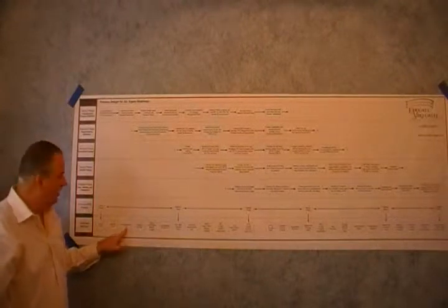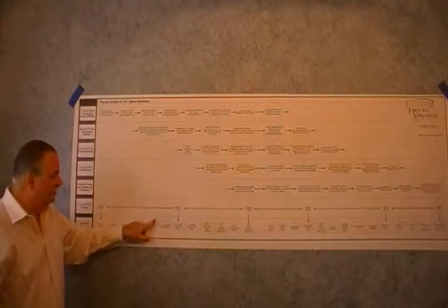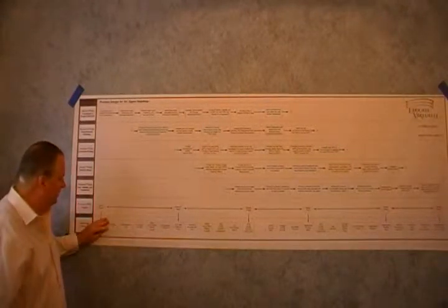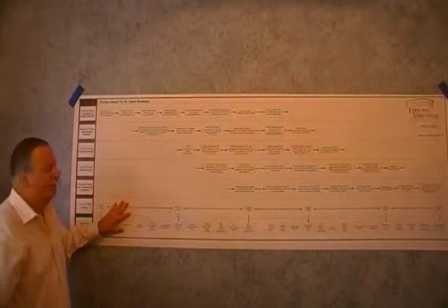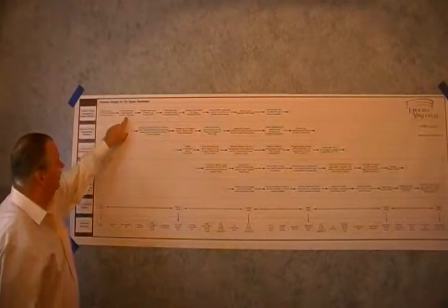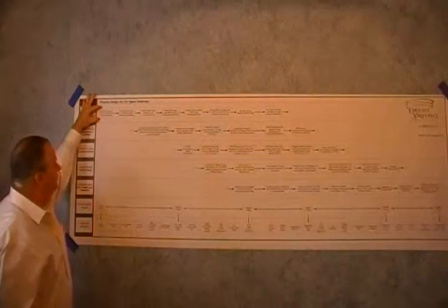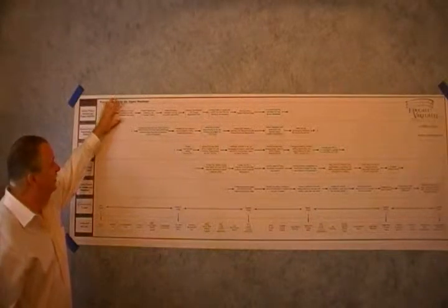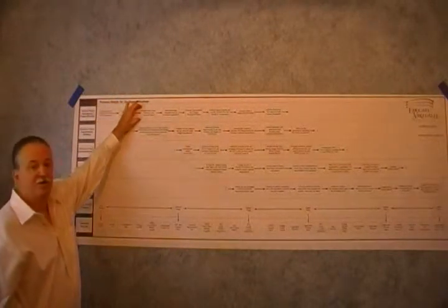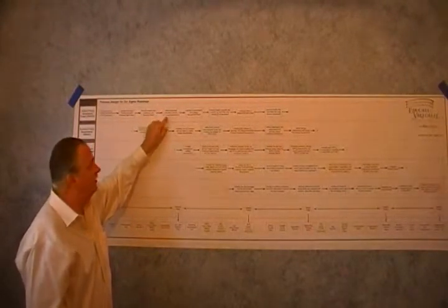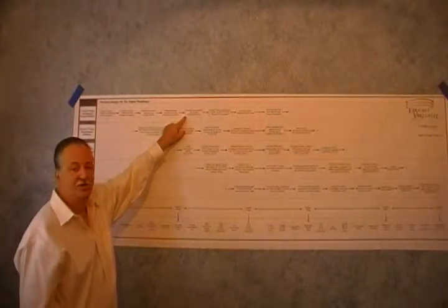The tools would be a project charter, business case, a communication plan, change management plan, the use of failure mode effects analysis, and the deliverable is the project plan, and that is going to give you everything you need to define your project. All right, so this is a development project definition. And we walk through each of those, confirm that it's worthwhile to the organization to do this. You put together your project charter and your business case initially. What are the goals, objectives, and what are your success criteria? Define the process description and the conceptual organization at a very high level here. Develop your communication and change management plans.